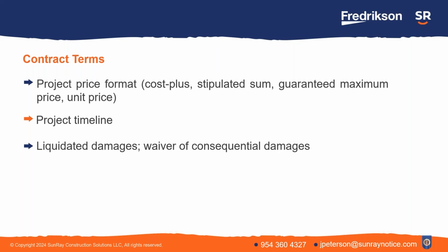So you'd owe $30,000 in delay damages, which would ordinarily be deducted from the final payment. That's one way to specify the risk of being late. You can plan ahead of time on what it will be, regardless of whether or not their delay damages are a lot higher or a lot lower. You as the construction firm will have the ability to plan economically what the cost of delay will be.